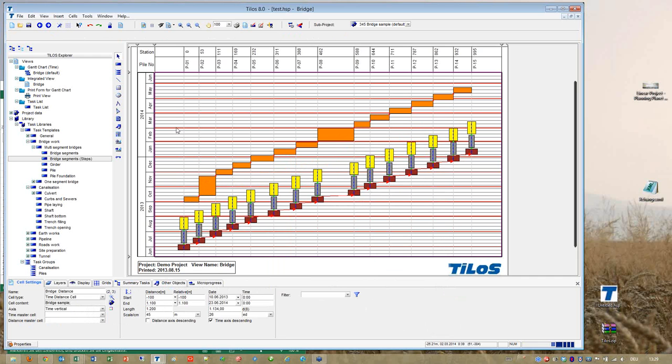So you see, with these repetitive functions, we can very easily create a big number of activities without a lot of editing work. This is very helpful, for example, for creating the work for the masts for electrification, or for creating activities, for example, for these culverts. Wherever the profile says here is something, then a task for this is generated.